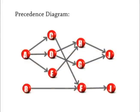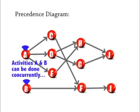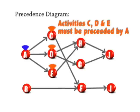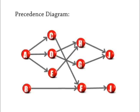Using this information, we can draw a precedence diagram. If you look at the precedence diagram, you can see all of the paths that go through our project, and there are many different paths. This means that some activities can be done concurrently — simultaneously — while some activities cannot be done that way. They have to have the previous activity completed before you can move on. This drawing, this precedence diagram, gives you a pictorial view of what the project should look like.